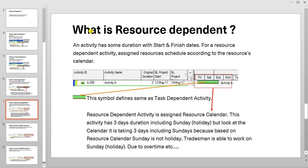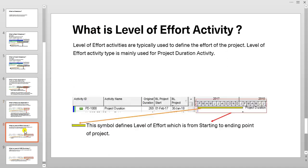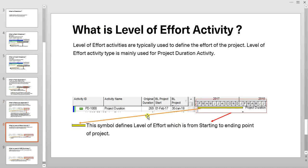What is resource dependent? Resource dependent activity type is same as task dependent, but behave according to the assigned calendar to the resources. We are going to know more in details about resource dependent while we will cover the topic related to resources and resource loading in the following videos.